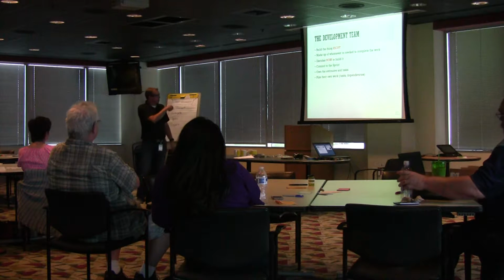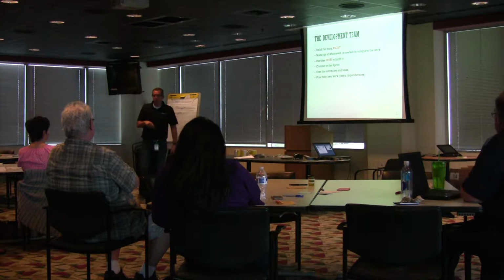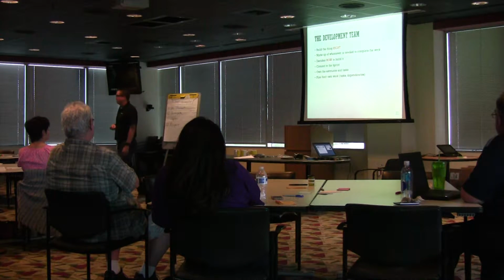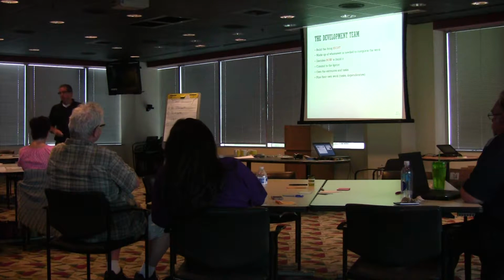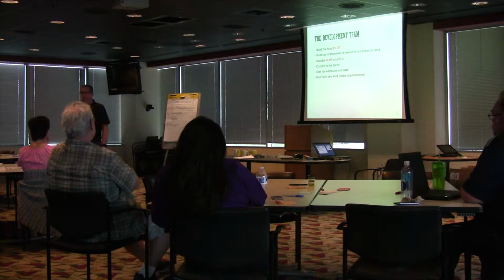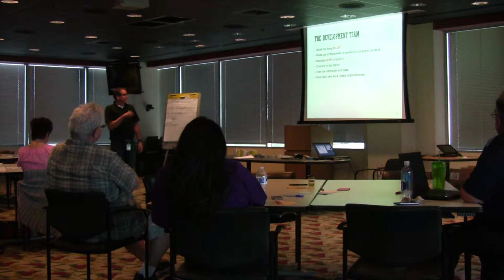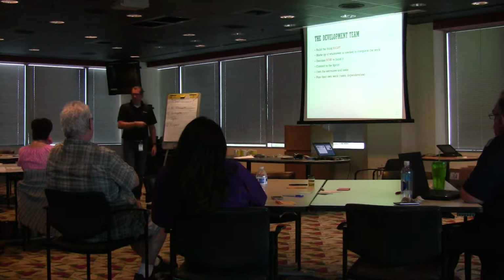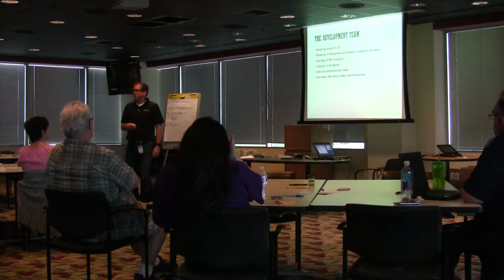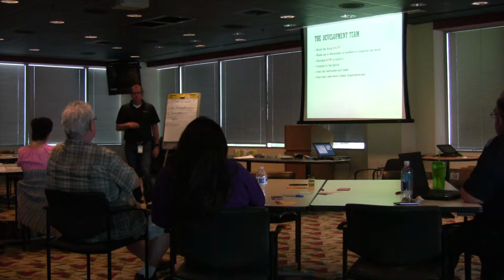In an Agile or in a Scrum framework, the team is responsible for coming up with those estimates and committing to them, building that plan together. As a team, as a group. Not as an individual, but as a group. They plan their own work, tasks, and dependencies, and they talk through those. If there are dependencies across teams, they are responsible for working with the other teams to understand those dependencies.